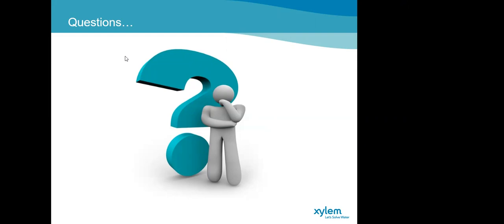Okay, so I've got another question for you. When should the declaration of site readiness be sent back? Okay, right. As I mentioned during the presentation, declarations of site readiness are issued for each phase of our installation: first fix, second fix, and finally commissioning.